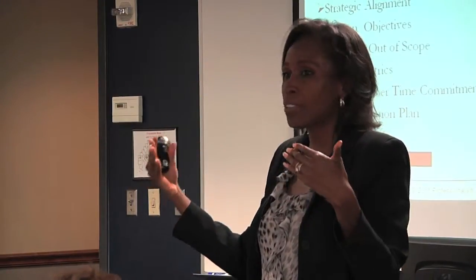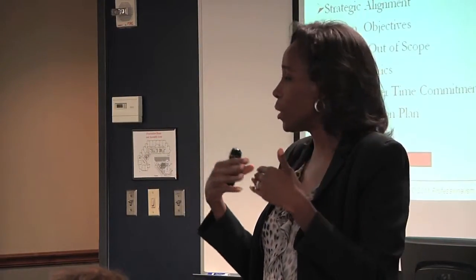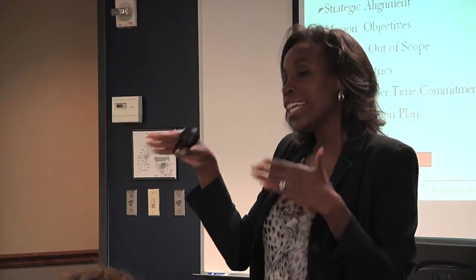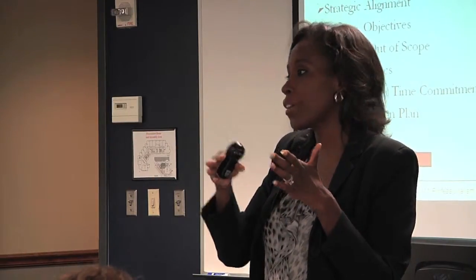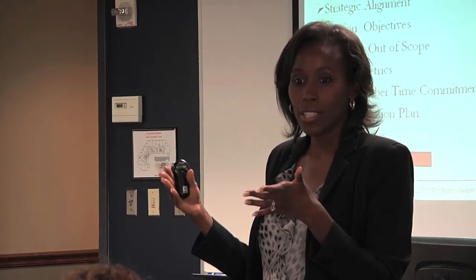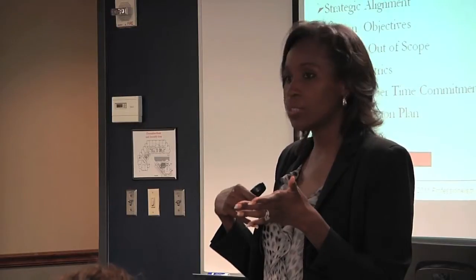Really, really important to clarify that. So what do we really need in terms of the time commitments? And are they always consistent? If you need me 10 hours a week in January, are you still going to need me 10 hours a week in December? Or does it fluctuate at all? Do you see why it's important to clarify this really early on?